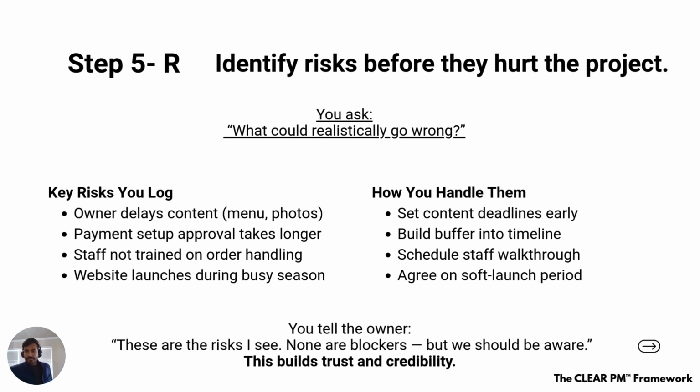Payment setup, right? There are always some legal steps. You need to register, you need to satisfy some of the rules based on what business you have, and that can take a longer time. This is always a risk. Staff not trained on order handling. There may be a chance that the website is running, but staff cannot understand what to do when an order comes. You should think about how you can put the training in place.